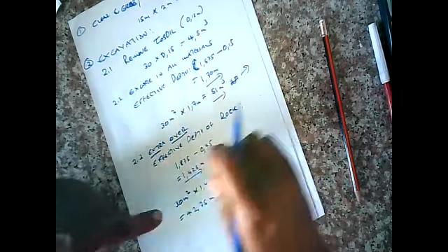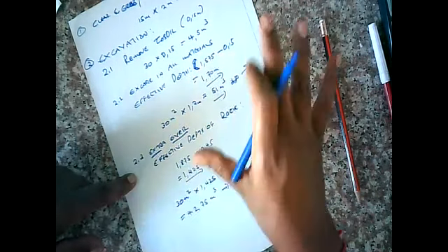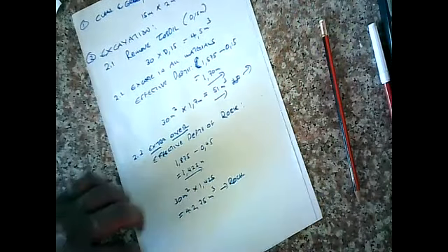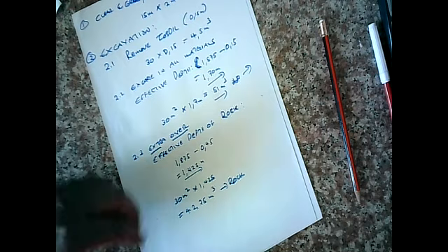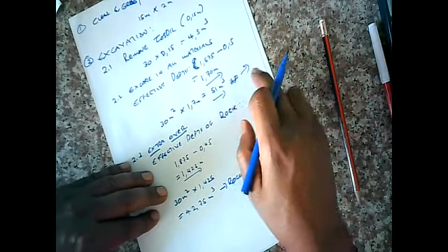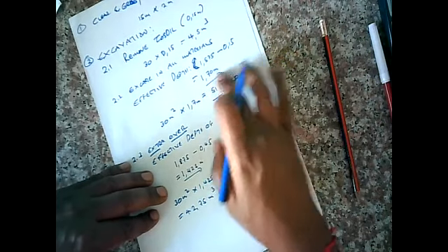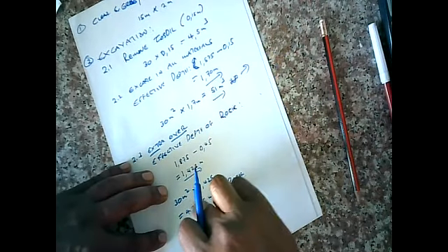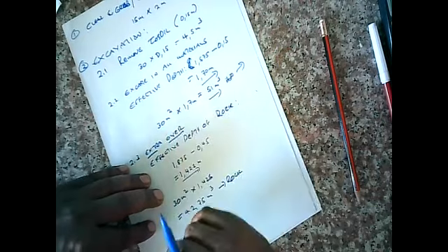Okay, in your bill of quantities, can you see it's 2.3? It's an extra line item we're going to pay him for to excavate that rock. But we pay him just to move that rock. Notice this is, move that material. Moving all the material, excavating the hard part, he gets paid for it.